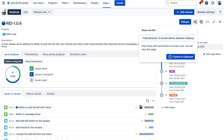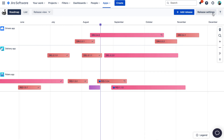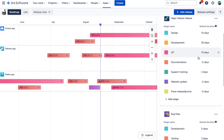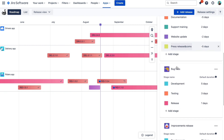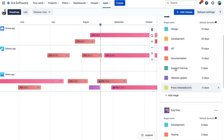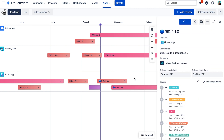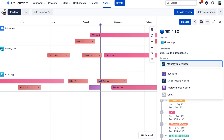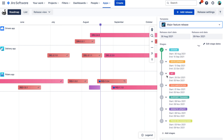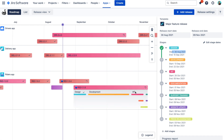The release isn't just about sending the latest code to the customer. There are many other activities that need to happen, like writing release notes, updating documentation or the website, press releases and so on. Many teams have adopted release checklists to track these. In Swanly, you can use templates and stages to create your own release checklist. After you assign the desired template to your release, you can see your stages in the section over here and mark them as done once you finish them. You can also assign dates to your stages to see them all on the roadmap itself.